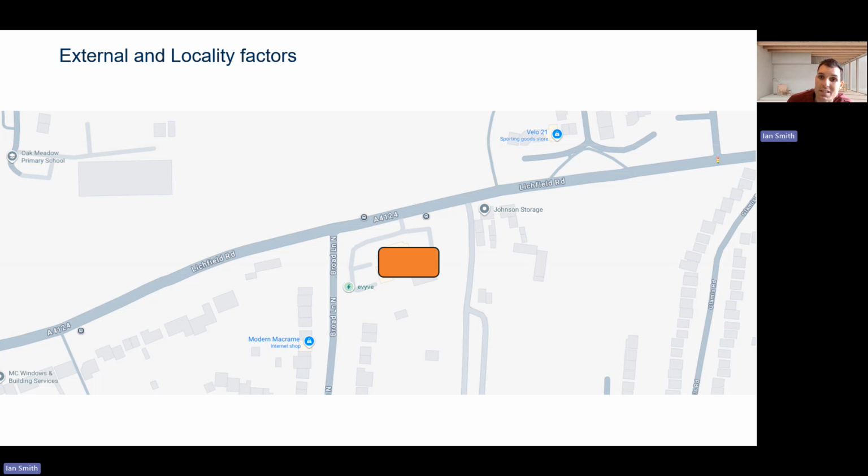When it comes to the site itself, some of our surveys have identified there's potential contamination in parts of the site, and so this could potentially affect our foundation depths and excavation methods and material and storage locations, and so requires specific handling and disposal of excavated material to prevent environmental harm.